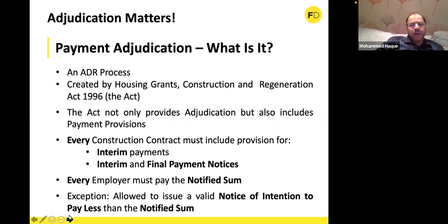And thirdly, it's normally not in contracts where it's a consumer contract, for the extension or building of residential premises where the employer is going to use it as their primary occupation. It's not for those contracts, but normally in business contracts you cannot avoid them, and every contract will have a mandatory interim payment regime. The only exception is if it's for a short duration, specified within the contract as a very short period, a specific number of days. You can go to the Act and find out. That's not my focus here, so I'm not explaining that any further.